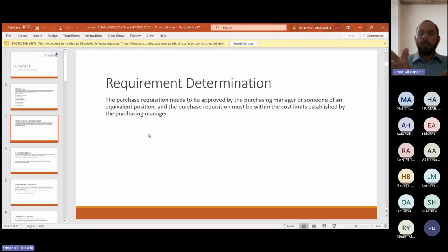He's responsible for some responsibilities. The project engineer is just like a project manager, but he's responsible for some batch of the project, or phase of the project, or part of the project, one of the many zones of the project. So for example, if we have 8 zones or 5 zones in the project, the project manager wants what we can call sub project managers. Each one will be responsible for his zone. What do I mean? I mean, if we have different zones and the project is big.